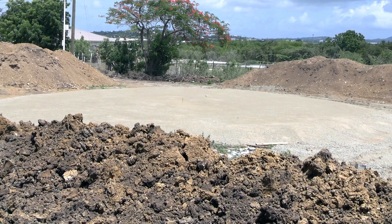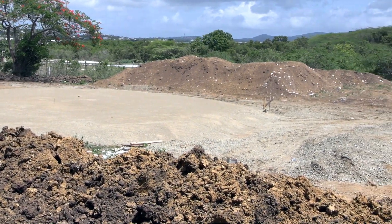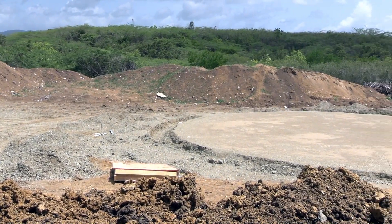You want to shed some light on the contingency arrangement, the workaround? Sure. We have a smaller tank. Keep in mind, the main tanks that we are talking about here are 350,000 gallons each, and there are two of them. So we intend to use a smaller tank that will be used for distributing water onto our system.